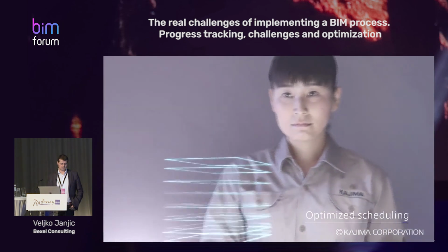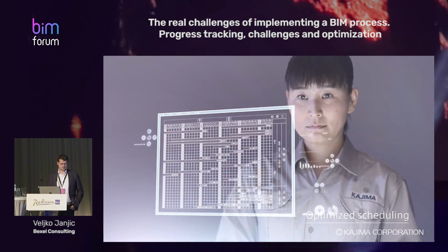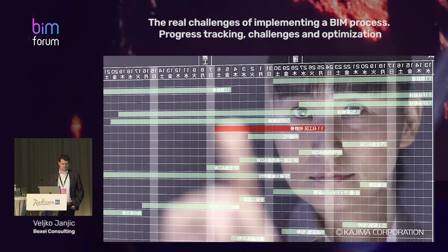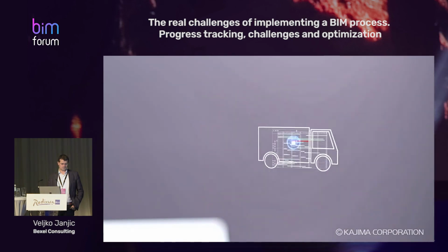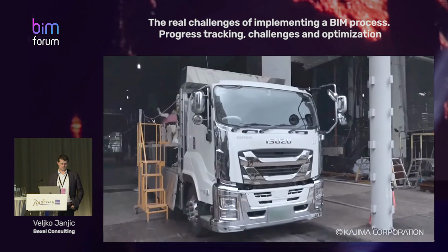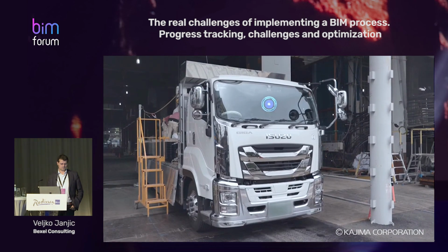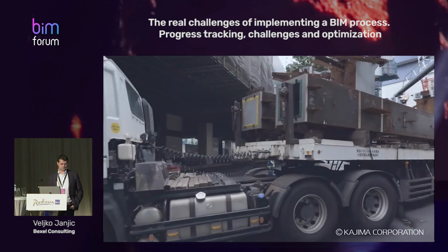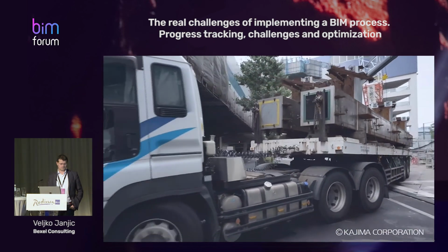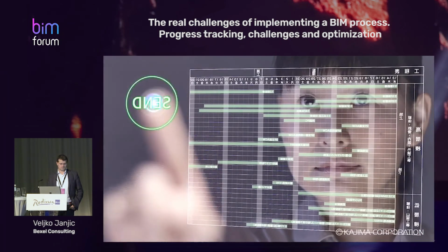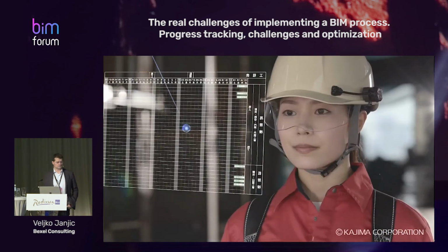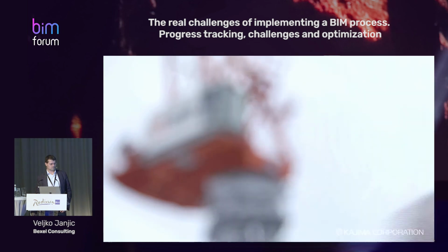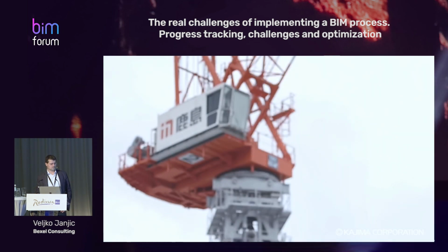Based on real-time information from the job site, adjustments to fabrication and delivery schedule can be managed. Sharing the site status and plans with suppliers and subcontractors will improve coordination, thus reducing unnecessary work in the field. With the information from the job site and the addition of remote management resources, a higher level of schedule and quality control can be achieved, resulting in smarter project management.